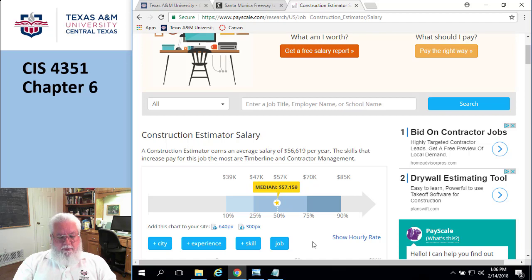Okay. Whew. All right. So just to make this a little bit more complicated, we're going to throw another one in there. This is the one that drives people nuts too. The duration is not the level of effort. Okay? All right, so one more time. 8 roofers came out to my house and spent 4 hours. That's 32 man hours. That is the level of effort. The duration is 4 hours. Not the level of effort. Level of effort was 32 man hours.